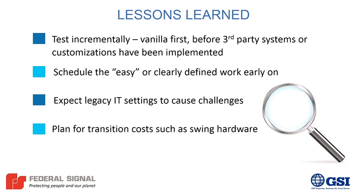Expecting legacy stuff, so I would see the lessons learned on that would be, a few of them would be DNS. We had some DNS issues when we brought our DNS over into our Active Directory environment. We had to learn a lot about the Oracle Cloud and whether it needed DNS in there, or we were using Terraform a little bit. Oracle was helping us out with that, to write scripts, and we just had to play around with learning that. We should have been testing that probably a little bit earlier in the process with DNS, but we learned. Well, we wouldn't have known.